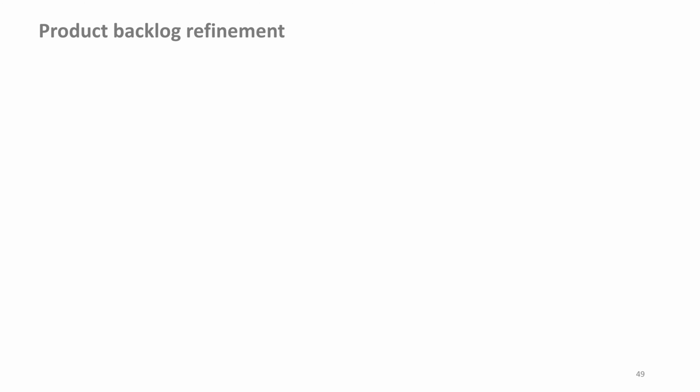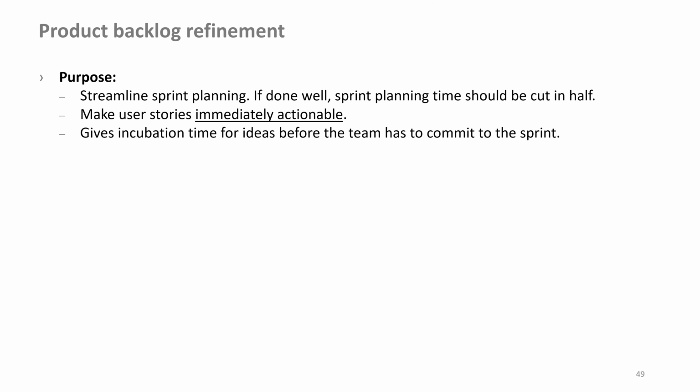Let's talk about the product backlog refinement. Purpose: streamline sprint planning. If done well, sprint planning time should be cut in half. Make user stories immediately actionable.